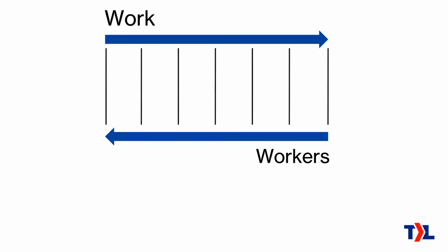The workers are separate. They are different. The individual people who are doing this work, they start at the right, and they look for work to do starting at the right, and then they move towards the left. What that does is help you to focus on finishing work rather than starting new work, because when they work from the right towards the left, they will be looking for the work that is closest to being done. So that's what helps keep your work in progress low and keeps your team fast and effective.